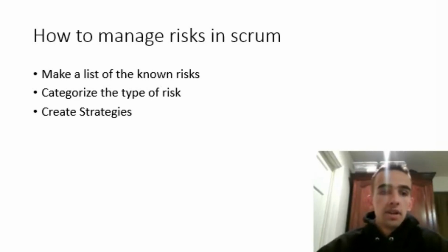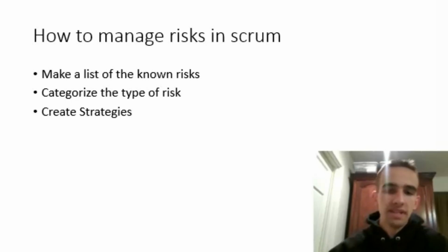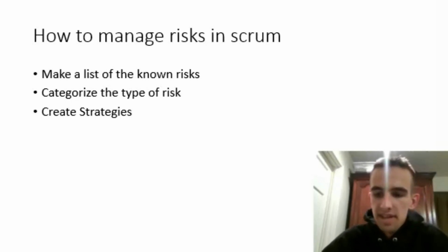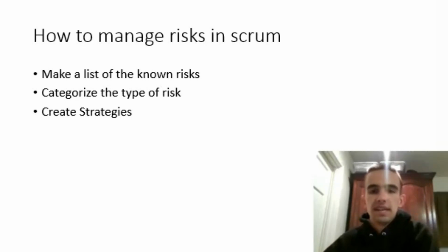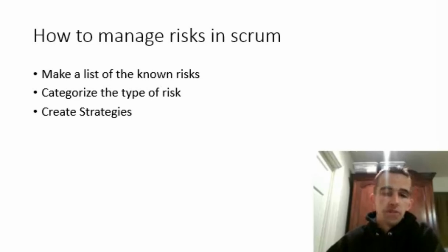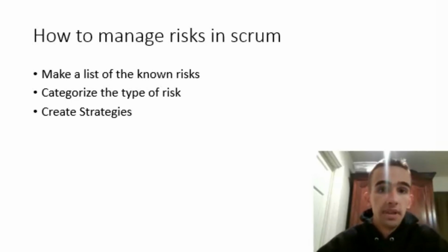And lastly, create strategies on how to manage those risks. It's worthwhile to ask as a team questions like, is it worthwhile to pay attention to that specific threat? How much effort is it going to take to manage that risk, to eliminate the risk pretty much? And how much damage can that risk cause to the company? Is it really worth that amount of time to eliminate the risk?